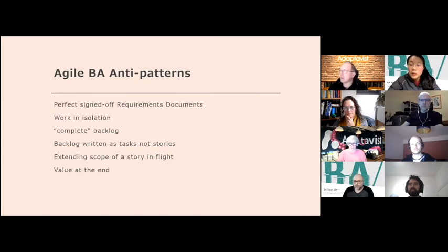Don't just keep taking things into the current sprint because you can, because there lies a land of pain and you end up in something completely unsustainable. We're always doing an all-nighter at the end of every sprint to deliver everything that we've suddenly got. And review your velocity. As a team, review what you've actually managed to deliver versus what you committed to, and adjust it down and adjust the expectations. Don't say, we'll do better next sprint. Be realistic, be honest. Have that position of psychological safety that you can say, we took too much on, and stop.